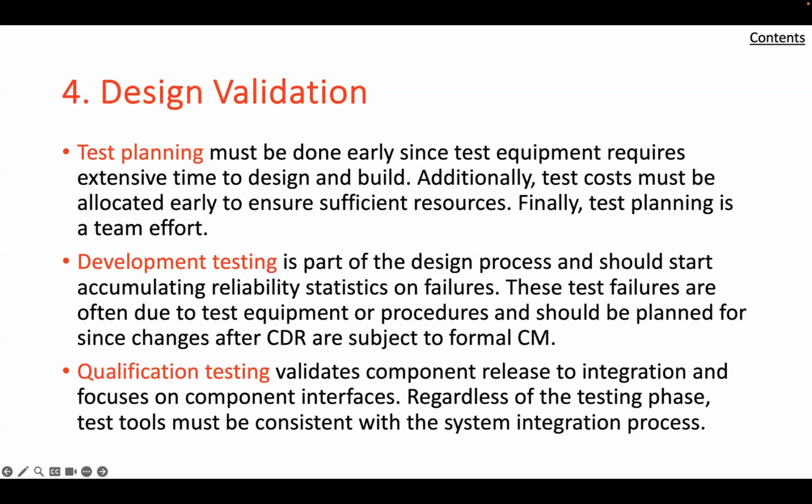The request should also contain trade-offs of alternative remedies, including possible relaxation of requirements, and an in-depth assessment of risk and costs associated with making the change. This formal process is not intended to prevent change, but to ensure that changes are introduced in an orderly and documented manner.